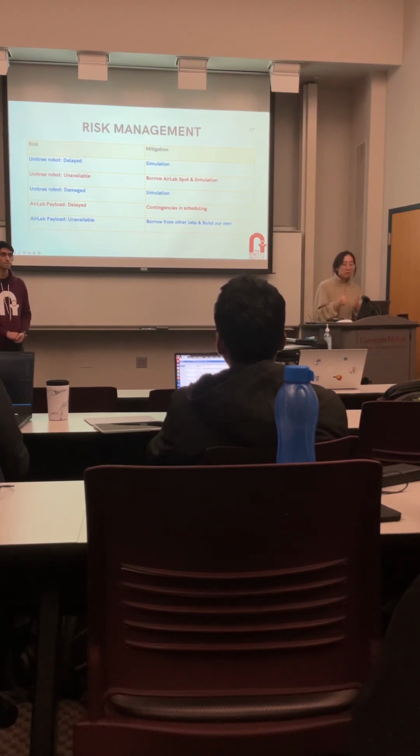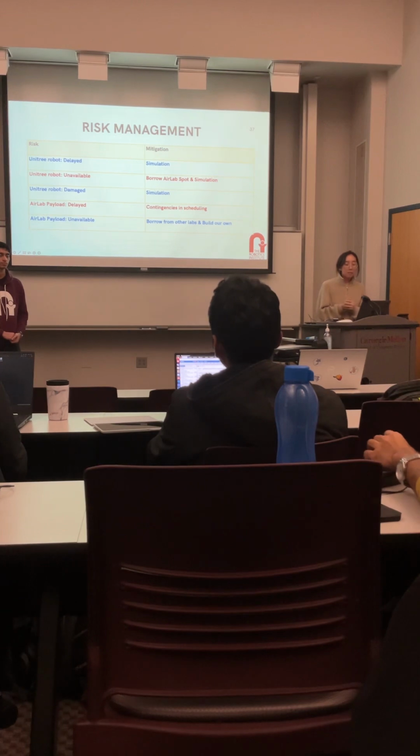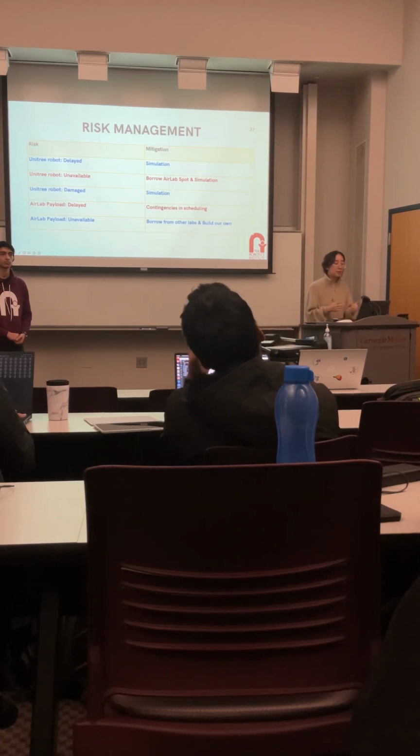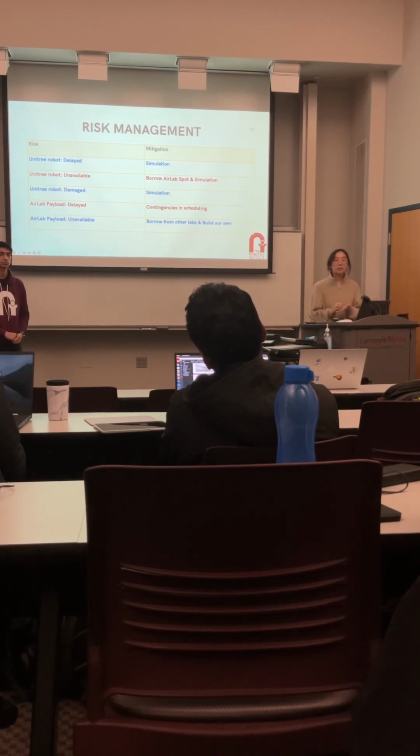In addition, there are two risks about the payload. The AirLab might be unable to give us the payload on time. We will plan schedule contingencies for this. The worst case is that the AirLab is unable to give us the payload at all. This is a bigger risk as we are using up all of our budget on the mobility platform. In this case, we will borrow sensors and a compute unit from other labs, starting with the Biorobotics Lab. We will design a CAD model for the frame and 3D print a custom payload for the robot.